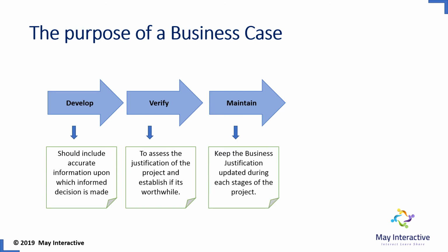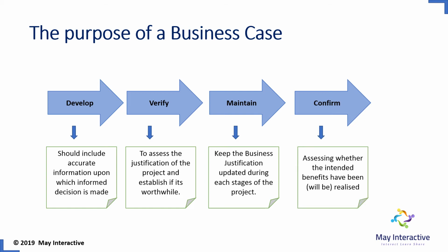Maintain. This involves record keeping. The business case must be continuously updated during each stage of the project. And confirm. At each stage of the project, it is assessed whether the intended benefits have been realized or will be realized.